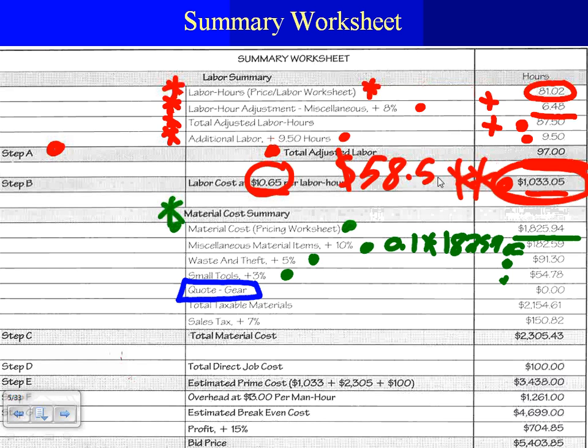The gear. What is the gear and the codes? Anybody knows what a code is? In the electrical industry, the major electrical equipment, because it is very expensive price-wise, instead of being taken as a component, they price it as a lump sum. For example, lights are notoriously famous for being coded.